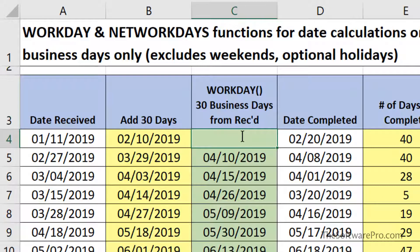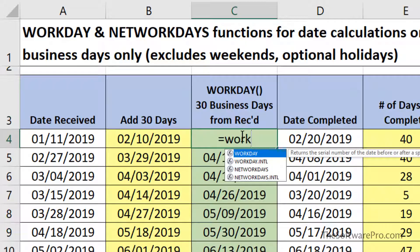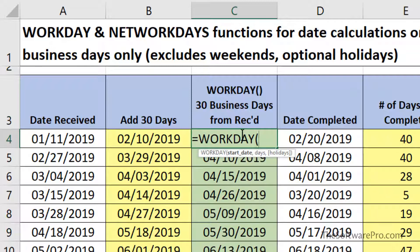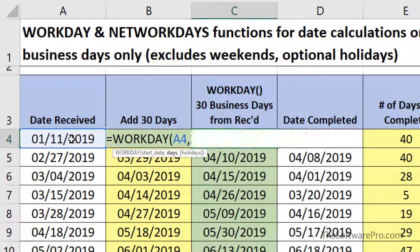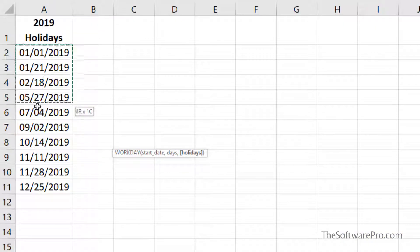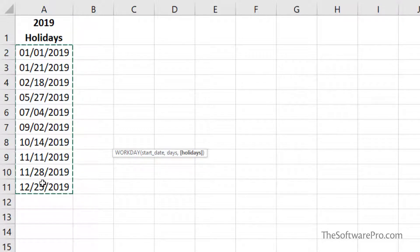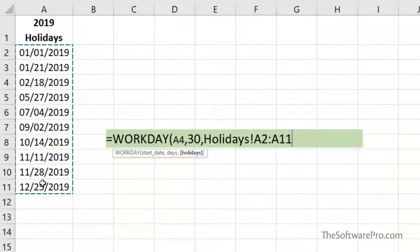Let's build the Workday function. Here you'll see the prompt: the start date — this is the date received — comma, the number of days. Here we could reference a specific cell; in this case I'll type in 30. And then the last part is holidays. This is optional, so you could simply close the formula, but we'll refer to that list of holidays. Simply highlight the dates, exclude the title. You could also use a named range for the holidays. And then finally hit Enter.